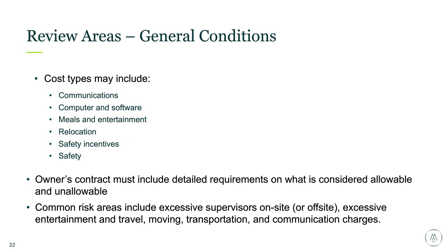Good contracts will include a clause that, and this is what I was talking about earlier, if it's not clearly defined within that matrix, for example, it's not a part of the cost of work, so it's not allowable unless they get owner approval. So having the matrix and clearly defining what's in and what's out, absent owner approval, is critical.